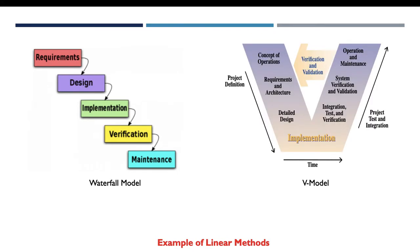Another example of linear methods is the V model. The V model is an extension of the waterfall model and is based on the association of test phases to the corresponding development phases. For each development phase we have a test phase, and at the implementation phase the process steps are bent upwards to form the typical V shape.